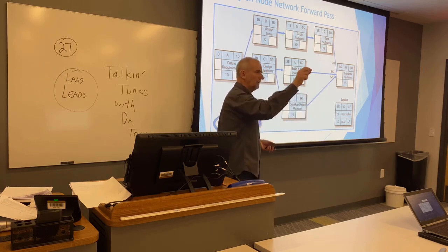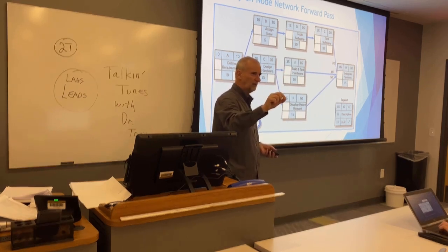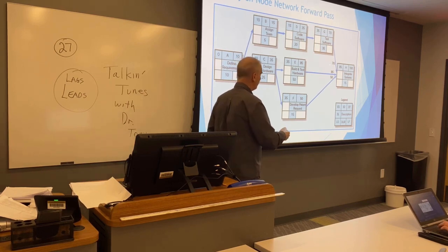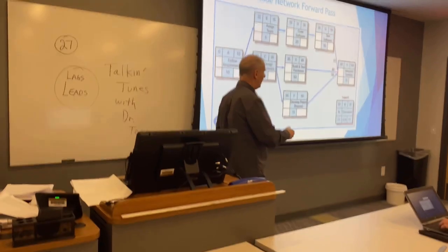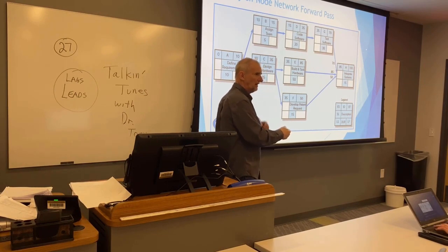Write that down. The latest, earliest finish. That sounds like an oxymoron. Right, Dylan? The latest, earliest finish. But that's true. Of these three earliest finishes right here, which one is the latest? What number? 85, so I put that there. You guys got it?